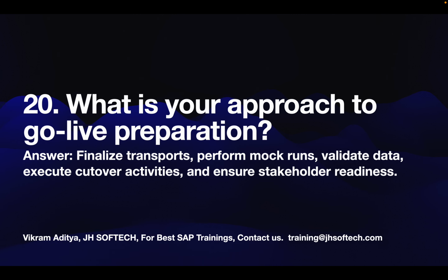What is your approach to go live preparation? Finalize transports, perform mock runs, validate data, execute cutover activities, and ensure stakeholder readiness, which are very important for go live preparation. These are a few of the question and answers I'm covering for the real-time project, and this is mandatory for every module, irrespective of which module you are working in SAP.